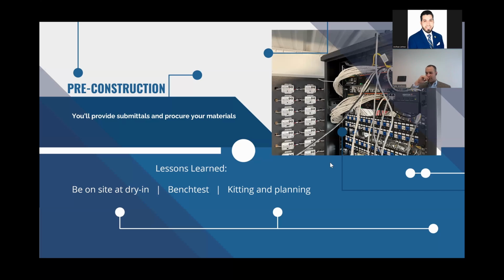So that's a great suggestion for those of you on Zoom. They're talking about videoing the location and putting distance markers on the video, so that you can say from this corner on this wall, you go over 5 feet, over 5 feet, and that's where it's going to be. It also gives you the chance to document that you're not next to a pipe. That's a really good suggestion.